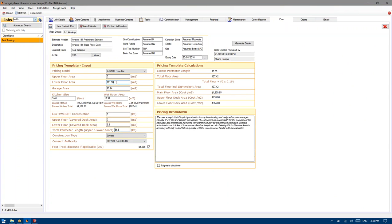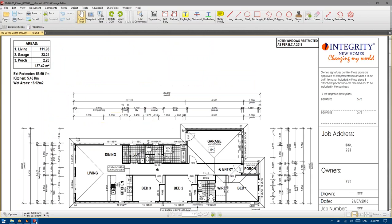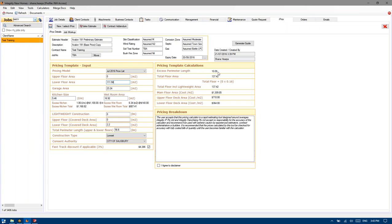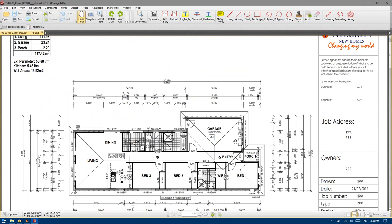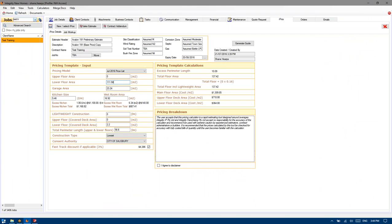So in this instance, if this house was 111.98 metres squared with a 23.24 metres squared garage, that overall area being 137.42 could be achieved far more effectively if there was no turns involved, if it was just a straight rectangle. As you can see, it's applied an excess charge of 10.09 lineal metres — effectively wasted length or additional complication not otherwise required for a perfect home.